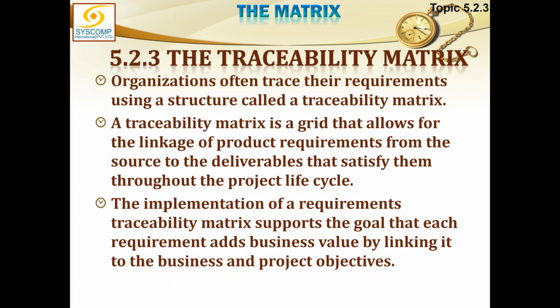Organizations often trace their requirements using a structure called a traceability matrix. So we are discussing the traceability matrix now. A traceability matrix is a grid that allows for the linkage of product requirements from the source to the deliverable that satisfy them throughout the project lifecycle.